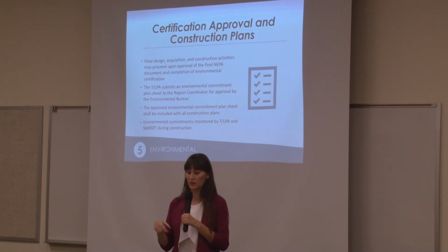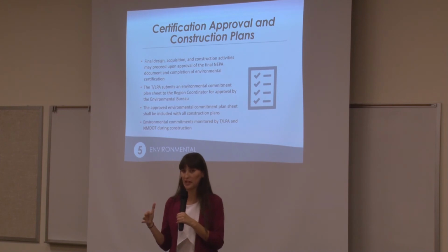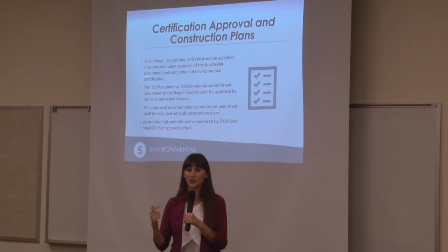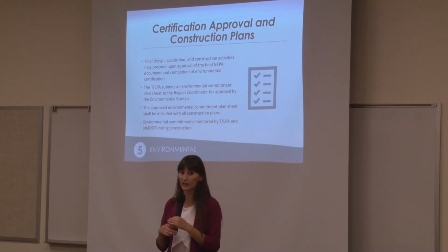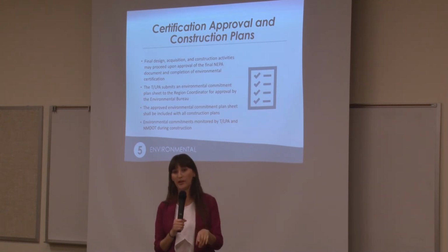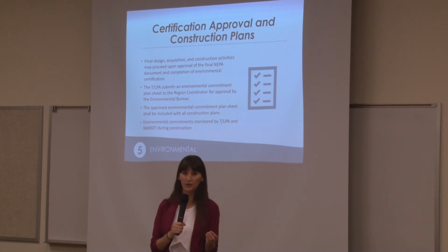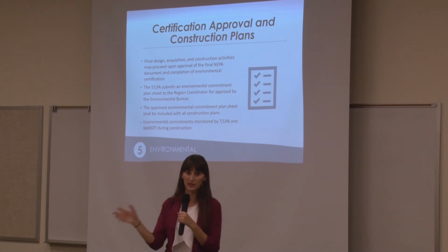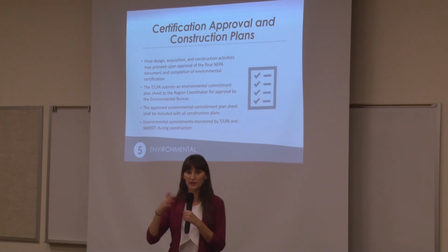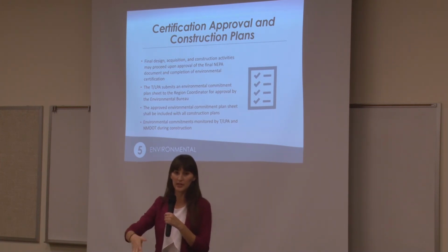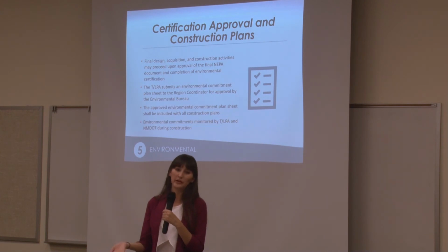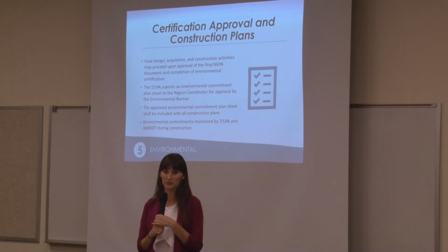The comment was that tribes are exempt from providing the environmental certification. That's not actually true. You still have to provide an environmental certification at PSNE. The documentation that's required to obtain that is different though. So you might not have all of the same components that the other entities do, but you'll still have to submit some form of documentation to your region coordinator to receive a clearance.